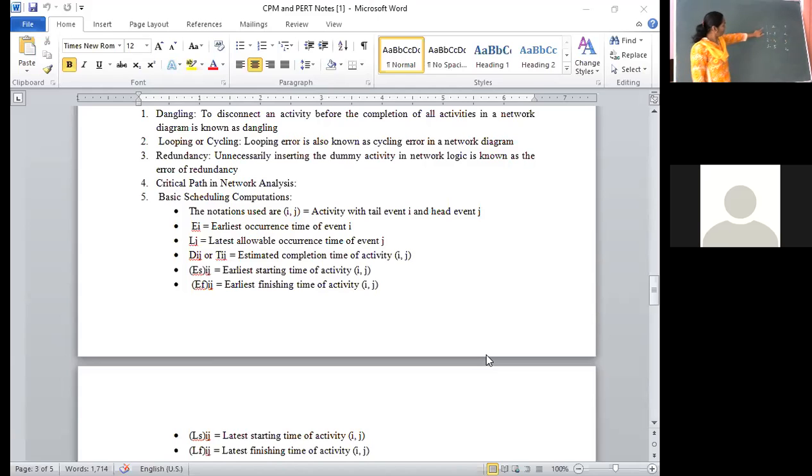What is the start event here? 1 is the start event. Here, what is the end event? 2. You cannot end there; just represent this as activity 2. Then the start node is 1. From 1, how many activities are starting? 1 goes to 2, 1 goes to 3. With a pencil you have to write. You should not end. 2 will be ended, then only 4 will start. Right now, close the node.